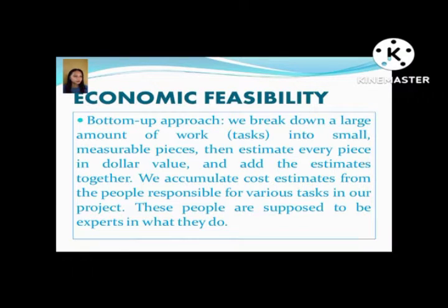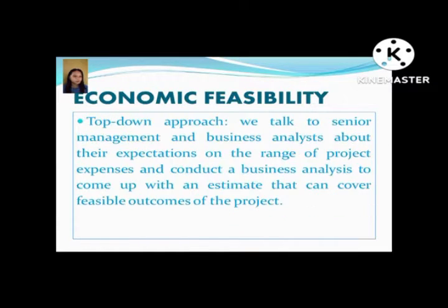We accumulate cost estimates from the people responsible for various tasks in our project. These people are supposed to be experts in what they do. Top-down approach. We talk to senior management and business analysts about their expectations and the range of project expenses and conduct a business analysis to come up with an estimate that can cover feasible outcomes of the project.